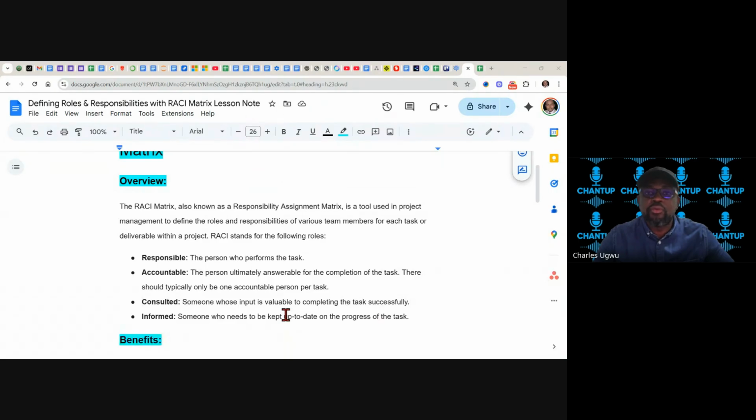And there is a way we do that. For you to keep him informed, if you go to the project collaborative environment, onboard such people, bring them on board, they will see everything that is going on. They are just there to monitor what's going on, but they are not going to make any inputs. Even if you don't send the reports to them, they are getting information because they have access to all the project environments.